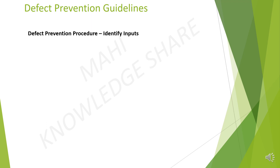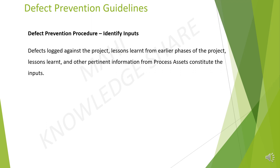First Step: Identify inputs. We will identify the inputs from the defects logged against the project, lessons learnt from earlier phases of the project, and lessons learnt and other pertinent information from process assessments.